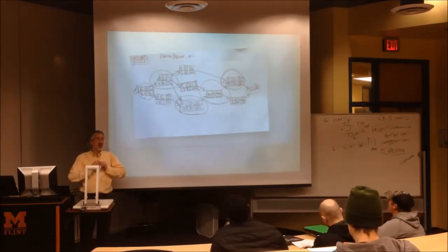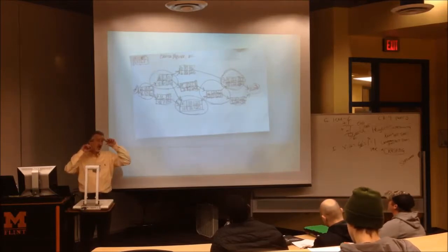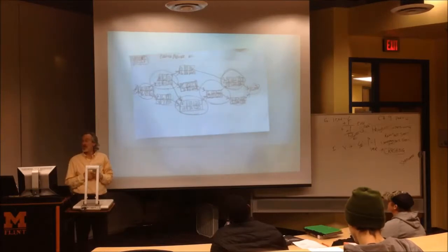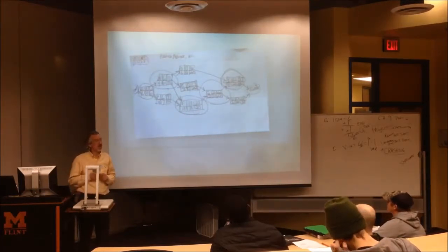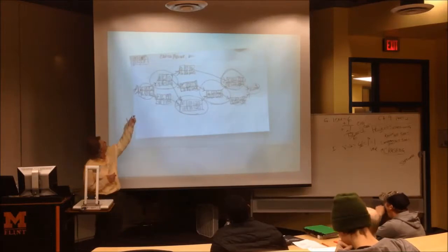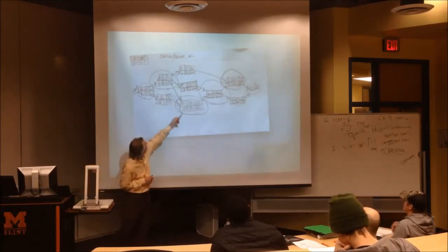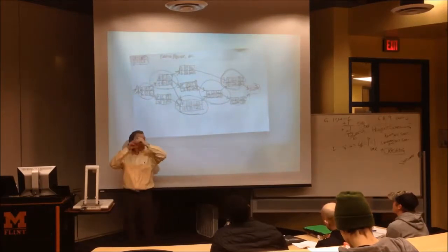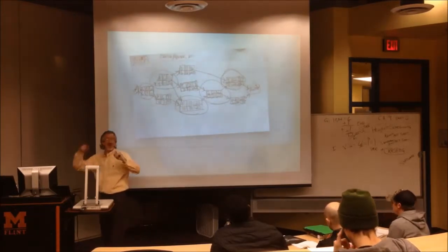There's your path. And if this were a project with uncertain activity times, and we had to start answering questions about what's the probability it would take this amount of time or that amount of time to finish, you would need the project variance. By doing that, you would find the variances of just the critical activities, A, B, F, G, I, and add them together. That's the variance of the project, then square root it.